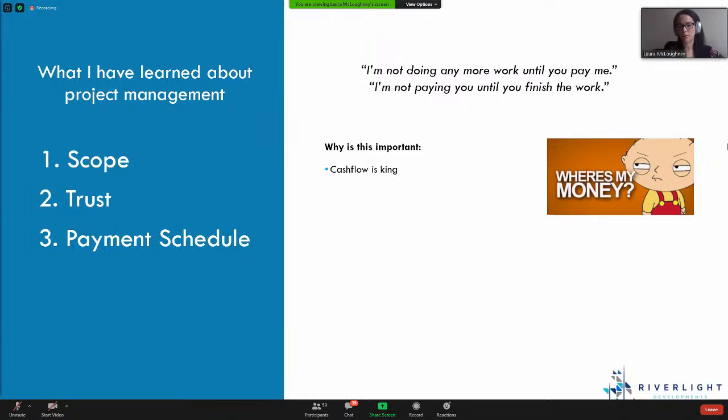So you need to make sure, exactly as Claudia was showing you, all that planning in the beginning, and making sure as a project manager, as you're moving to site, that we understand when things are going to be paid, when we're required to make sure all those timelines join up. Now, staged payments is another part of that conversation, and understanding when the contractor or all of the professionals are due payment, because you might not just have a contractor, you might have an architect, a surveyor, a joiner, there's 150 billion professionals that are going to be in there, and all of them are going to want to get paid. You, the project manager, have to understand at every core part what money is due, who is due it, when is it due, and how am I going to pay them, and do I have the money to do that? So understanding all of those phased payments, exactly what Claudia was talking about earlier, and making sure that you get that right is such a key part, because missing that just creates problems.